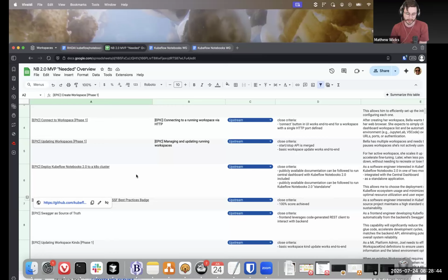But the thing that I think we do need to do then is change it from epics having owners to areas of the project having owners, and then assign areas to each epic. Someone does need to be the primary owner to actually curate the tasks, epics and work items. It was kind of what we were effectively doing anyway. If it's a front end one, whoever does front end stuff does that. If eventually we have sub areas of the front end, right?